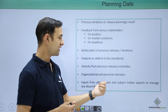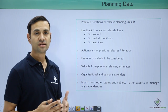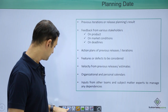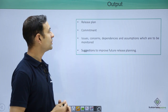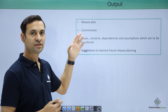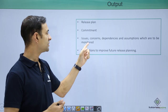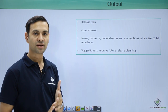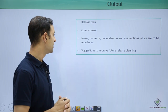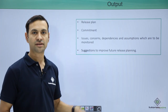Input from other teams and subject matter experts is required to manage any dependency, so that we can identify risks ahead of time. The final outcome would be a release plan with a set of commitments, issues, concerns, dependencies, and assumptions which are to be monitored properly during release planning. The final outcome is the release plan itself, along with any suggestions to improve future release plans, which act as action items.